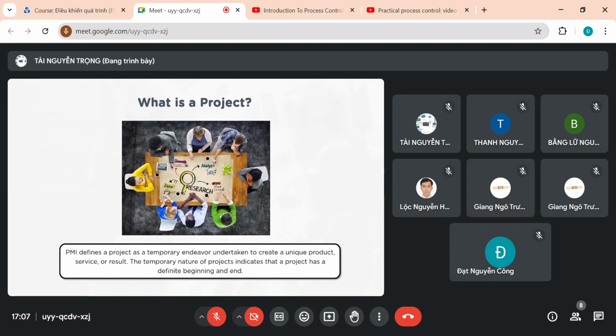So what is involved in the project life cycle? It involves 5 areas, 5 groups we can call them: initiation, planning, execution, monitoring and closure. Initiation is all about understanding what the project is, giving the basic understanding of the project, collating the details and having key stakeholders identified. In initiation, one has to clearly understand whether this project is worthwhile. One has to check the feasibility, measure whether the investment makes sense, and then confirm, yes, it makes sense to invest.